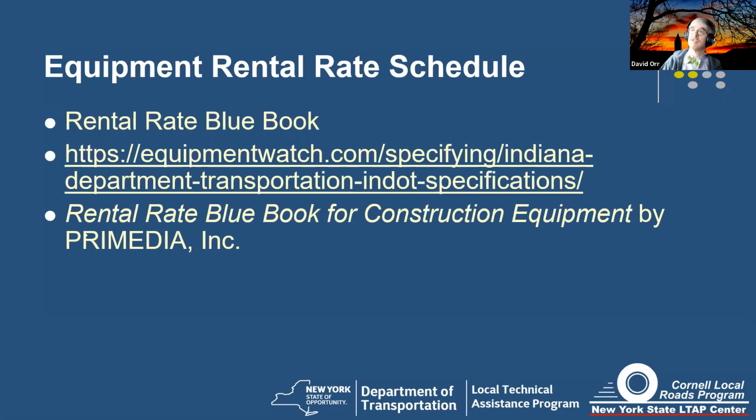Again, back to Means and Dodge. Yep, that's one. And then the really good source, surprisingly, for rental rates is FEMA. The emergency management folks actually have books for cost for recovering after a disaster. They actually have some pretty good lists. And the neat thing about their list is they've actually got some equipment that's not in some of the construction side because we use them for emergencies. So that's actually a pretty good place to go, is to check out FEMA and EPA rates.